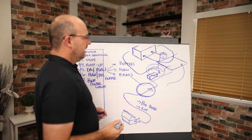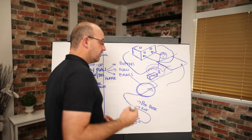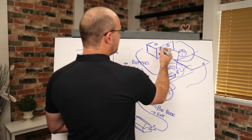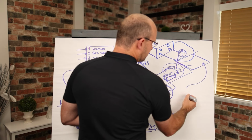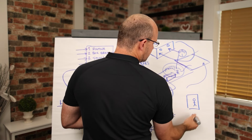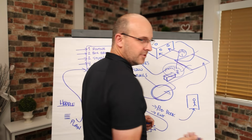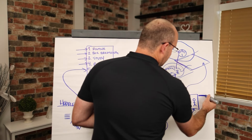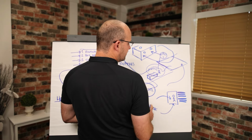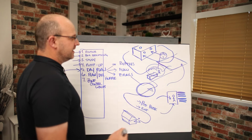And what you'll do is you'll check in if there's any key handoffs that have to happen where a crew needs to transition to another zone and there's a handoff. You'll go do a walk, and I've described this before. If the crew is about to finish in a zone, you literally go up and you say, "Hey, Foreman, I love you, buddy." You can say whatever you want. But, hey, are you ready for the next zone? And are you ready to sign off and finish and punch the list so that you pull the next contractor into that zone?